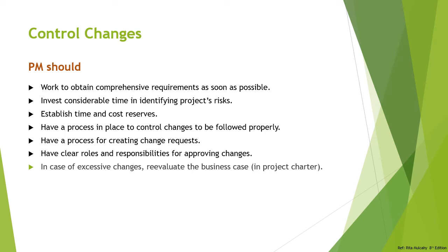In case of excessive changes, re-evaluate the business case. So if you have a lot of changes on the project, it means there is something wrong in your project initiation. So you need to re-evaluate your business case, why the project was started. Okay, allow only approved changes to be added to the baselines. Okay, this is a very important point. Only approved changes should be allowed to make any changes in your baselines.